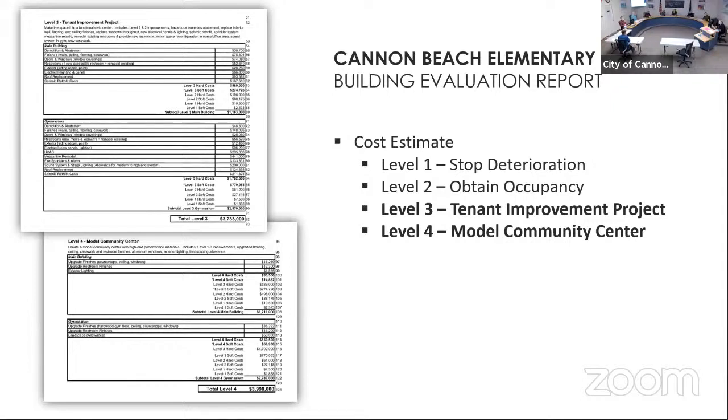That's for level 1. Level 1 is just repair it. Whatever, wherever it is, the total replacement of the classroom roof is a different topic. Yeah, we had that in level 3. We did have $100,000 to replace the roof in level 3. But let me tell you where we are. We have a real bad leak over the area that used to be the administration area, and we're looking at doing some kind of a repair there, but we're also having leaks in other locations. So we said, what's a price for being able to do the whole roof? And we were told it was around 95,000 or 100,000.